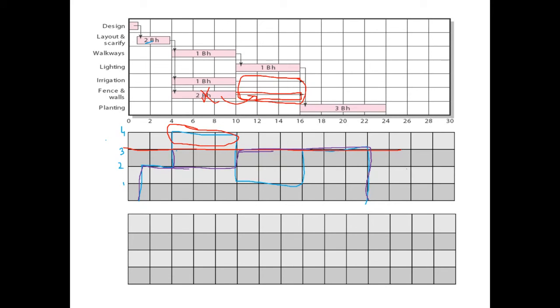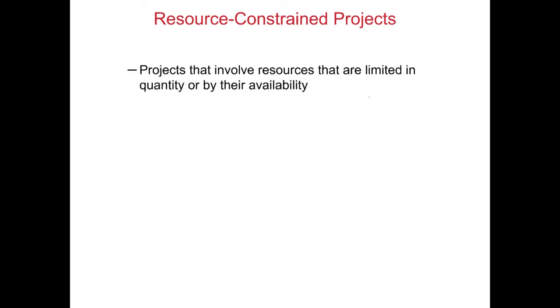And at the same time, we have not exceeded the, sorry, this is the final line. So we have not exceeded the project deadline, but just by using the float, we have been able to manage the constraint which has been given. Right, so this was an example where we have not jumped the time, but just by using the float, we managed our resource constraint.